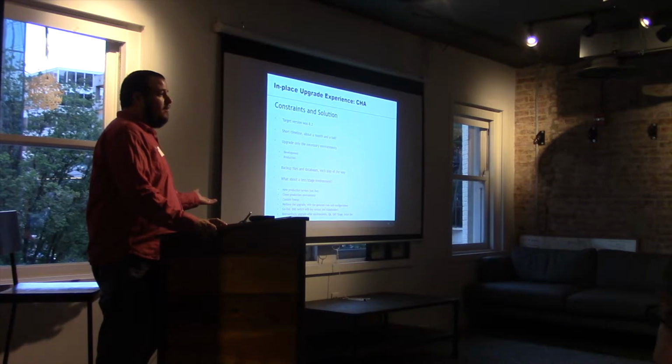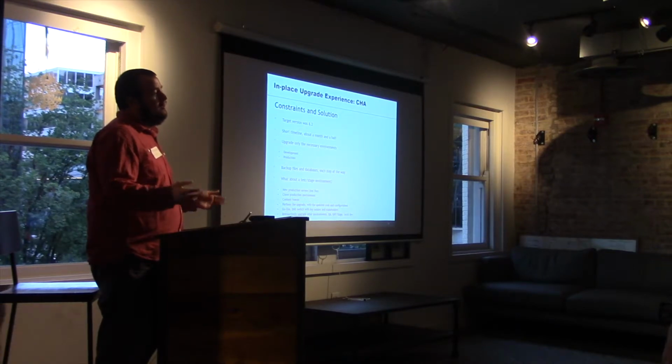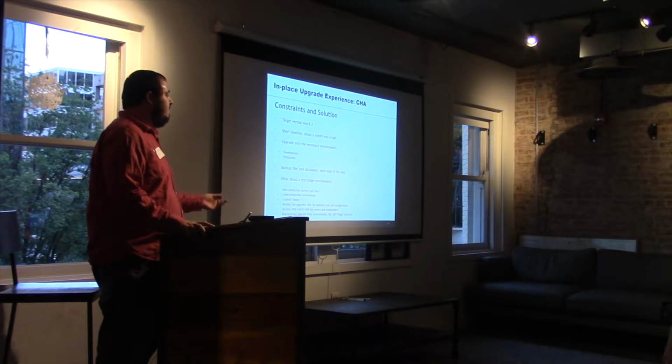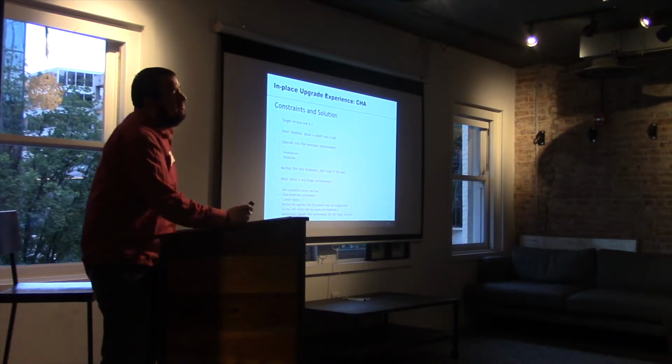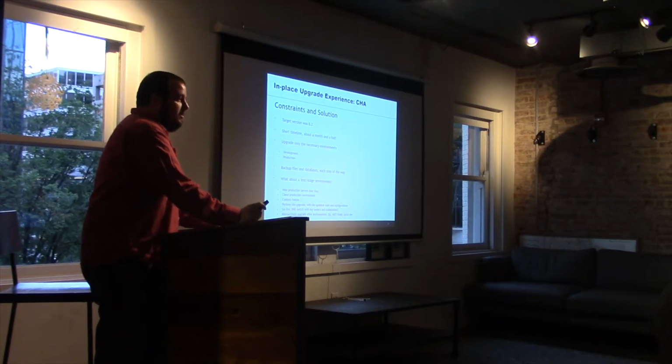After that, we had go live. We were comfortable with it. We then went ahead and retroactively upgraded any other environment that would support the project, such as QA, UAT, and any other local development environment. For all those other environments, did you go through all the manual steps, or was it just sort of like a copy over? Great question.